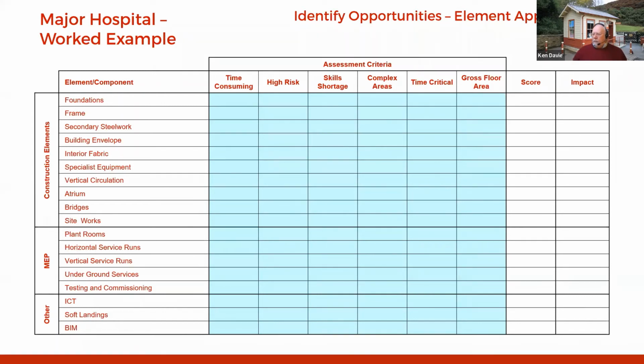matrix. So if you stick to that binary approach, you could actually grade them. You could say, well, foundations are time consuming, but they're not that time consuming. So if we go on a scale of 1 to 10, it might be a 6. However, in this instance, my approach was to use binary. So let's keep it simple. Yes, no. It's a high level assessment. You're not trying to go into any detail at this stage. The idea is to try and identify where the opportunities are and where best to put your resources.